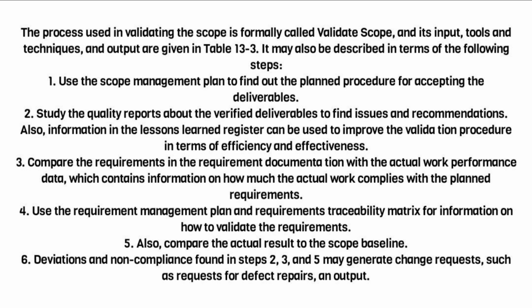It may also be described in terms of the following steps. 1. Use the scope management plan to find out the planned procedure for accepting the deliverables. 2. Study the quality reports about the verified deliverables to find issues and recommendations. Also, information in the lessons learned register can be used to improve the validation procedure in terms of efficiency